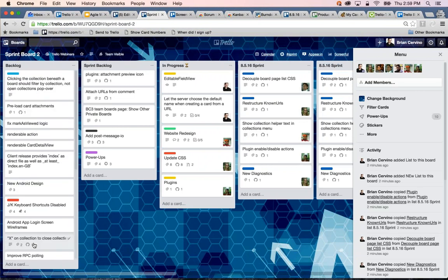Instead of having a list that gets too long to the point that you lose perspective on what your backlog is, having a separate backlog board set up in that way, where you can prioritize across lists, means that cards that are really high priority can be moved into future sprints. But cards that you're never going to get to can be archived or just left on that list out of view from your sprint list so they're not distracting. And if there's a card on your backlog list for something you'd like to do when you have more resources, you can always just move that card to high priority and then ship it off into a sprint. So I hope that answers your question on how you might be able to better tame your backlog lists.